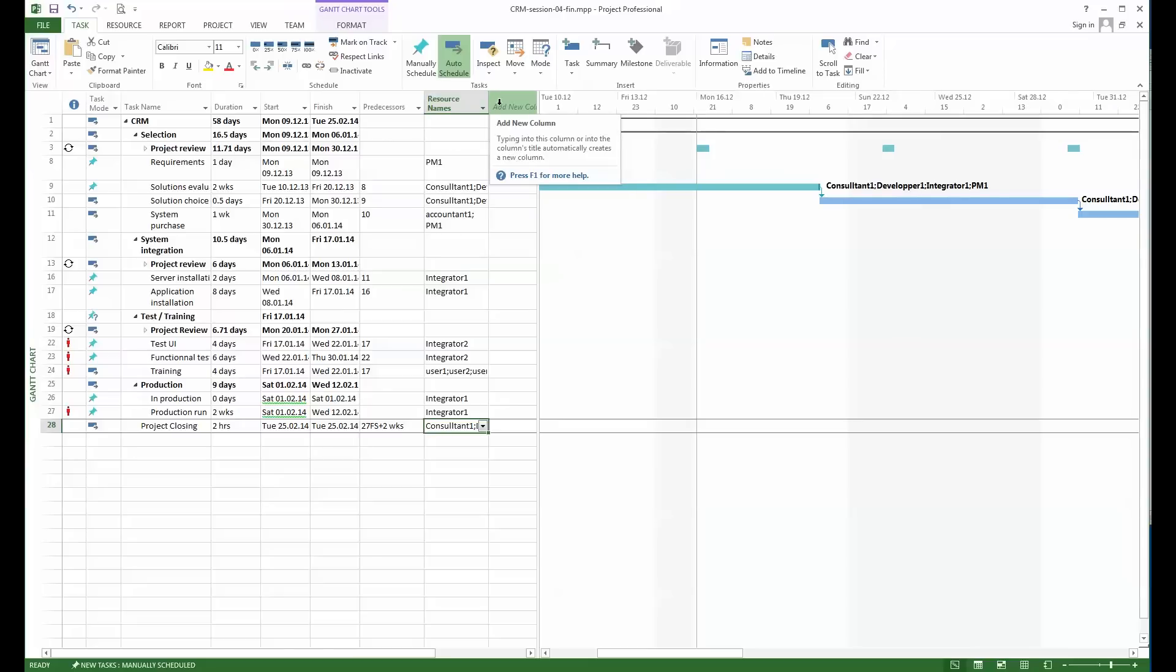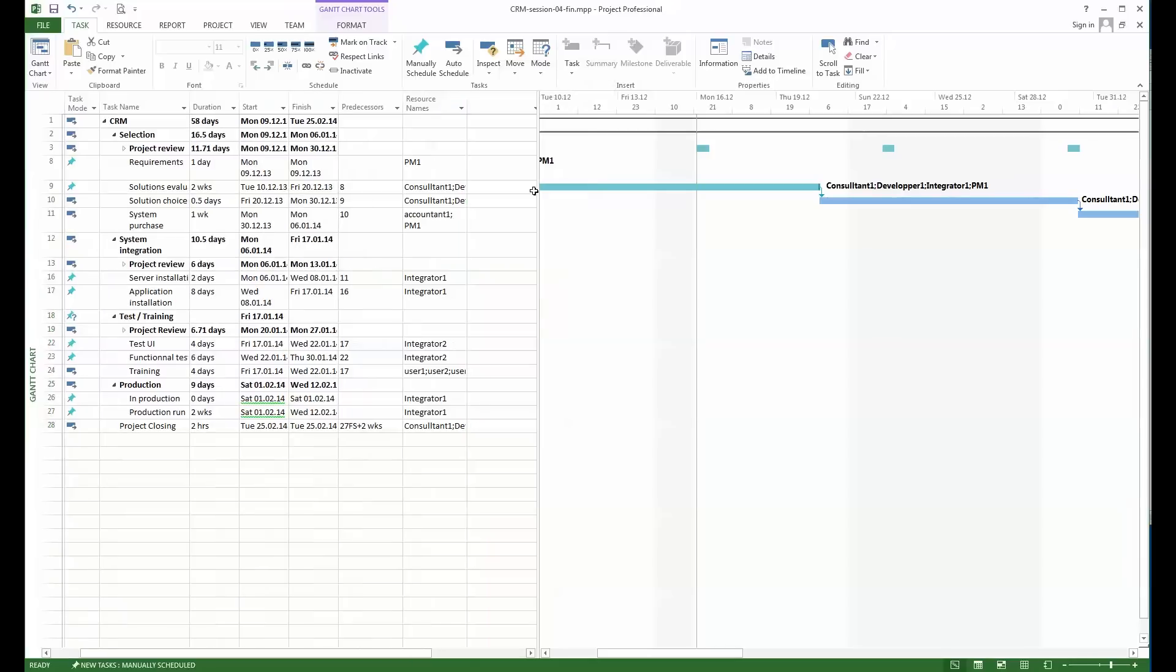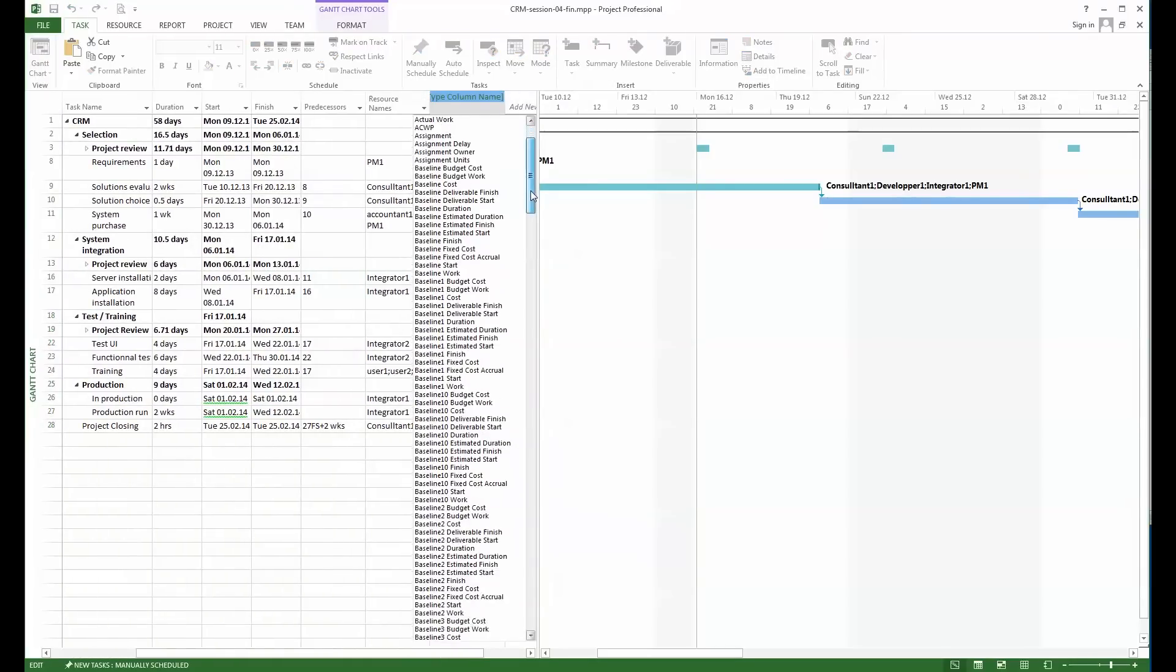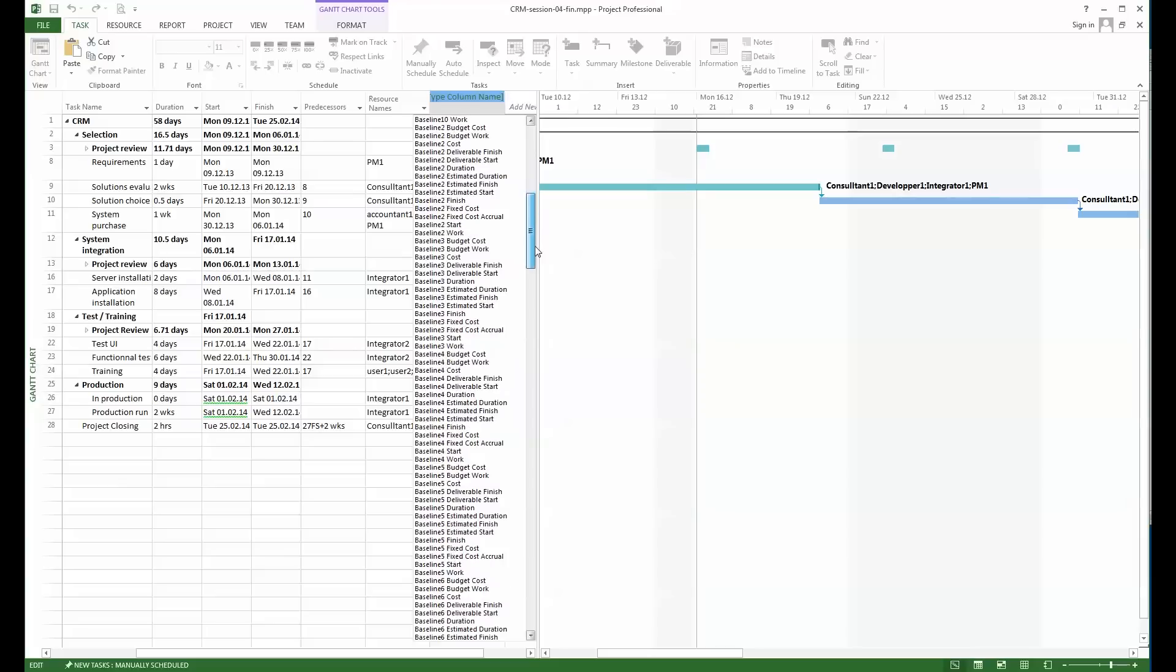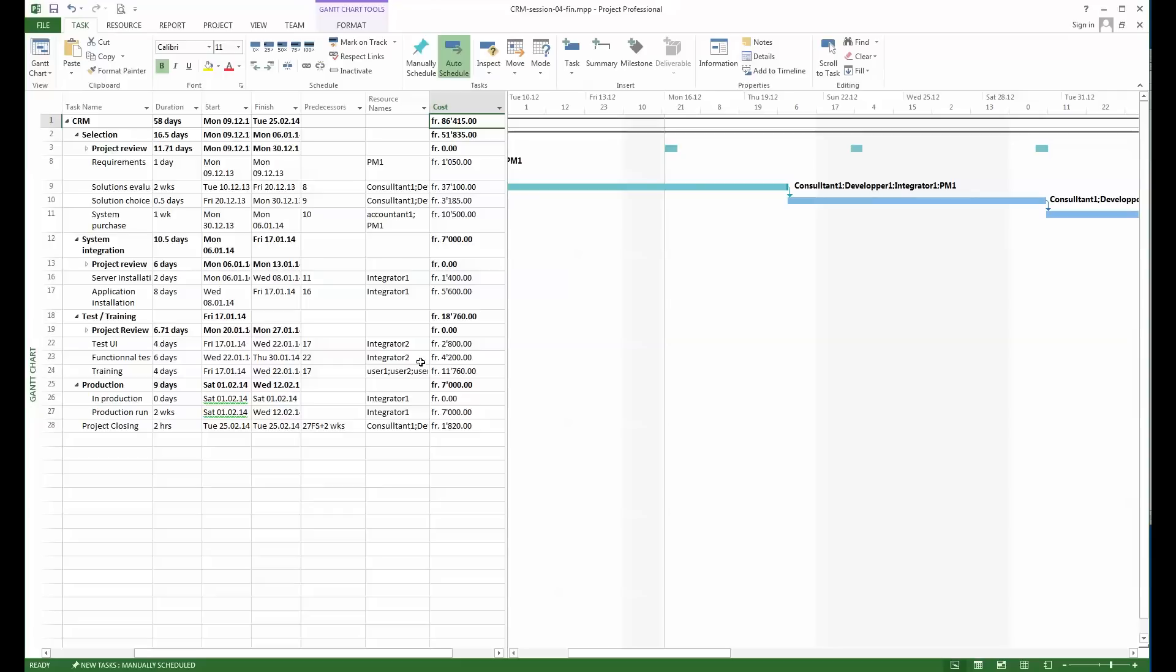At the moment we can say that we saw allocations of the resources, so now the question we can ask is what about the costs. To look at the cost I will insert a column here and I will look at the costs. I will simply choose here cost and we see all of a sudden for each task the amount that was required and then the total cost of the complete project.